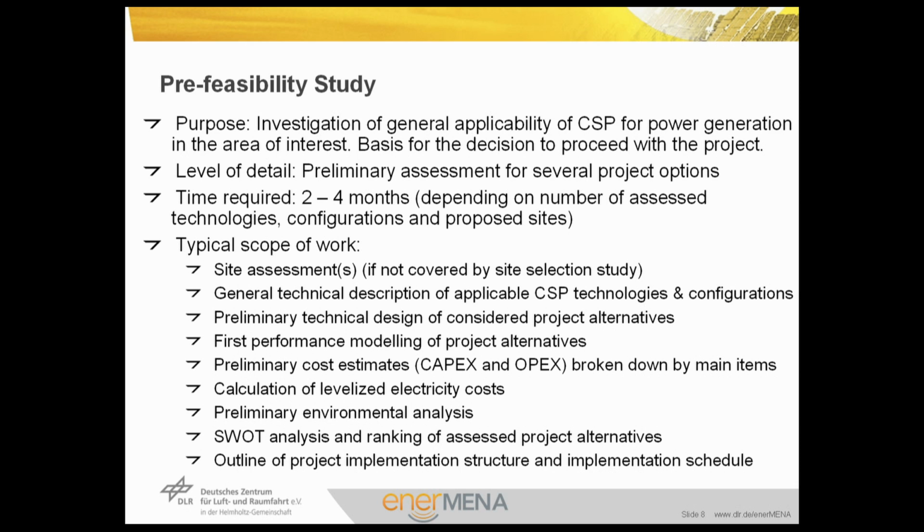So the typical scope of a pre-feasibility study is, again, site assessment, if this is not covered by a site selection study. This would also be re-evaluated in the pre-feasibility study to check the decision made for this site, by the way. The general technical description of applicable CSP technologies and, of course, the configurations will be included in the scope.